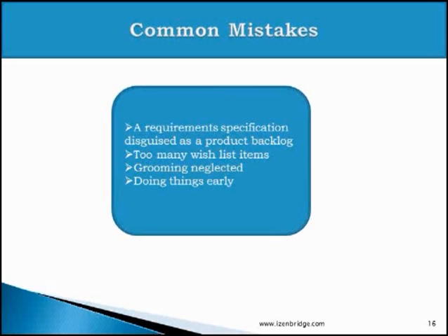Common mistakes. Sometimes we start thinking of a product backlog as a requirement specification document. There are cases I have seen a team doing it. They have a big requirement document which is baselined, which is signed, and now they are creating a product backlog out of that requirement document, and there is no expectation of emerging or reprioritizing during the project life cycle.